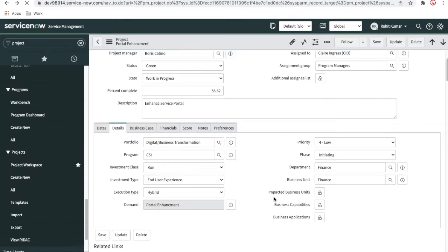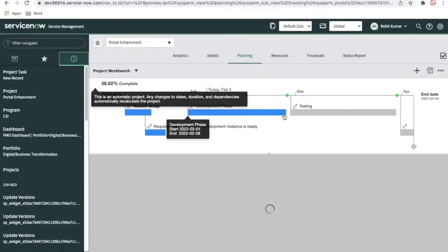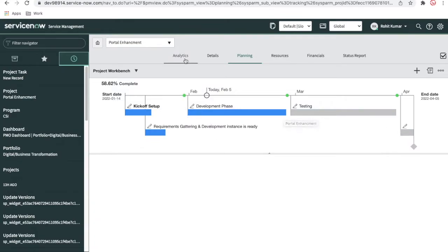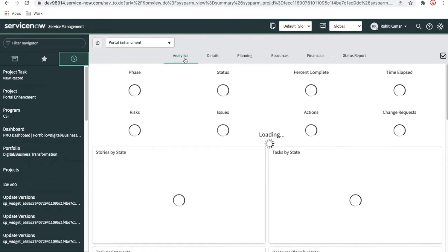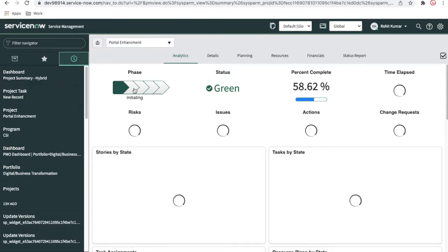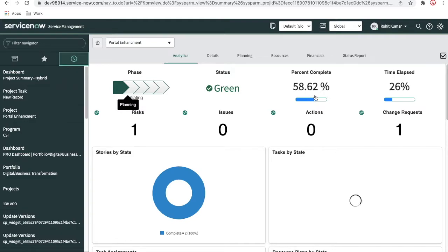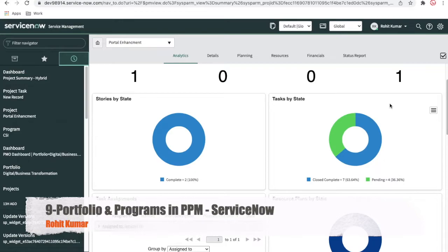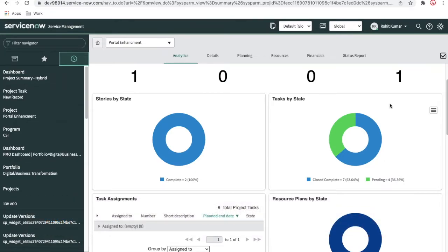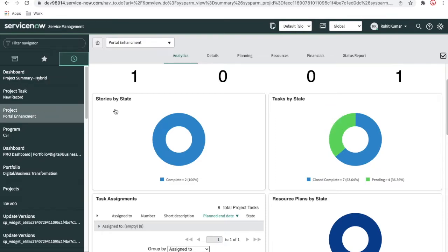This is our project here. You can see the project workbench — so far we have completed some tasks, and now we'll close all the remaining tasks in the testing phase and production movement phase. Looking at the analysis part — the project completion is at 58% and the time elapsed is 26%. So that's how it looks right now. We'll close all our tasks and then I'll show you how the project task view looks.